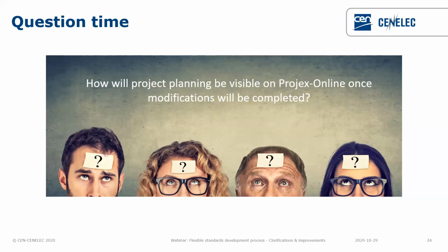So the advice would be, if you realize that you are late, you have a delay in meeting the planned dates, please use the one change option, please use the tolerance, and of course, as a last resort, benefit from the fact that CCMC will not cancel projects that are delayed, that are late. But please use first the elements that you have.